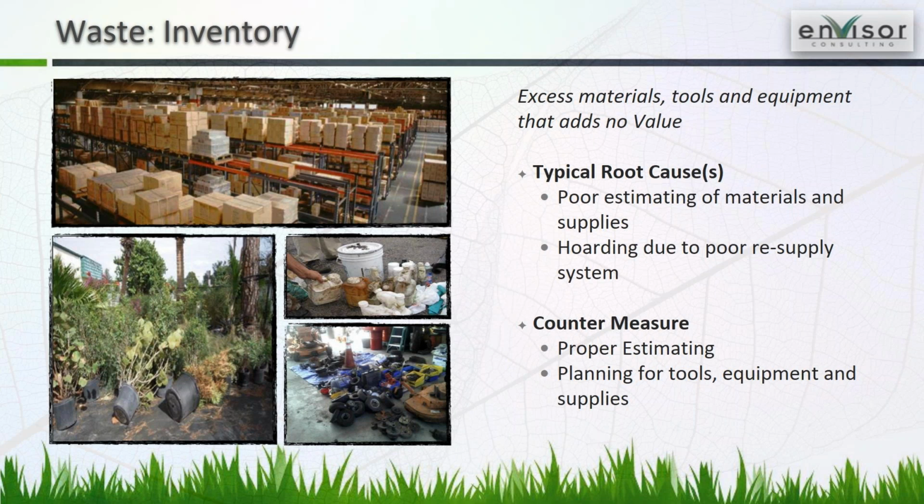I kind of think at this point in my career, if I sent somebody out to fertilize a property with 12 bags of granular fert and they spread 11.5 bags, just throw that other half a bag in the hopper and go back over the frontage and double up on it, rather than taking that half a bag back to the shop, because inevitably, if you take it back to the shop, it's going to get wet. It's going to turn into this fertilizer brick that we can't do anything with, and it's going to sit around the shop for years. So there are 2 areas, agronomic product management and living plant material management, where you can potentially have waste associated with inventory.